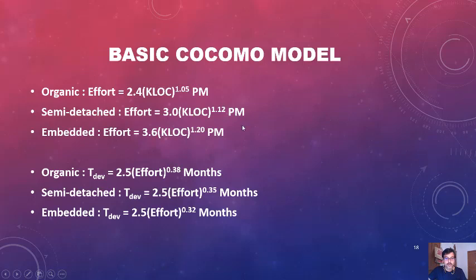In the basic COCOMO model, if we find out the effort and product size, we can see that the effort required to develop a product increases rapidly with the project size.